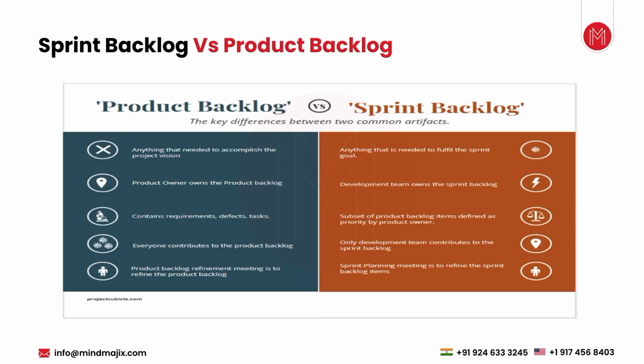Now, when the scrum team meets, they will again do the prioritization and refinement and bring out that only 75 features are something which we can deliver. Okay, so they can develop 75 features. Now the product owner will define the order. They will decide that out of those 75 features, which feature would be on top and which would be on the bottom, and how many sprints are required to complete. So this is what happens in the product backlog refinement.